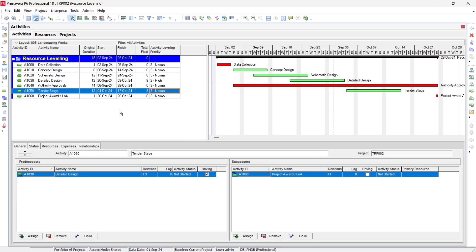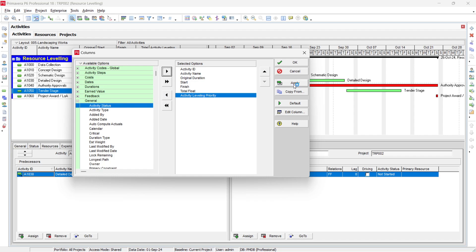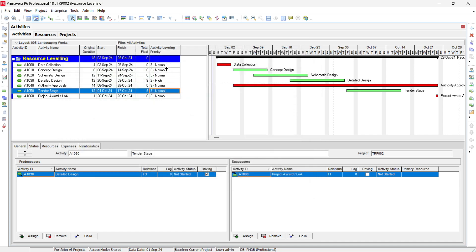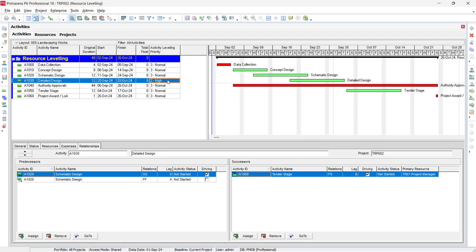Similarly, you have Activity Leveling Priority. Go to the General tab and you will find this field — add it to the right-hand side and click Apply. By default all activities have Normal priority, but you can change individual activities. For example, Detailed Design can be set to High priority. Structure, facade work, and authority approvals can also be assigned High priority, while less critical trades like blockwork can be assigned lower priority.